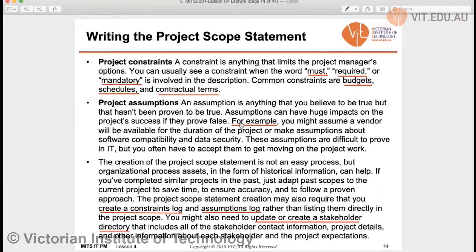Finally, project assumptions, which we also discussed previously. For example, you might assume a vendor will be available for the duration of your project, or make assumptions about software compatibility and data security. However, if an assumption proves unsuccessful — for instance, if your vendor is not available — you can miss the entire project schedule, which is devastating. Assumptions imply risk, but they must be stated so we can take necessary actions and precautions.